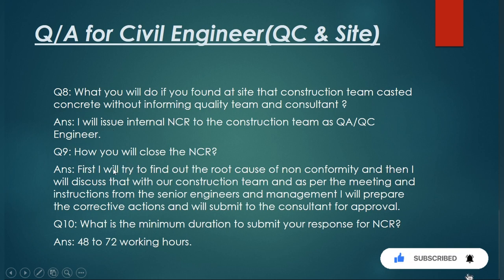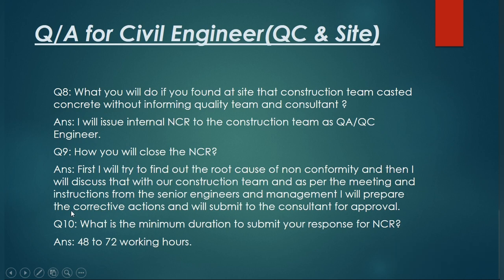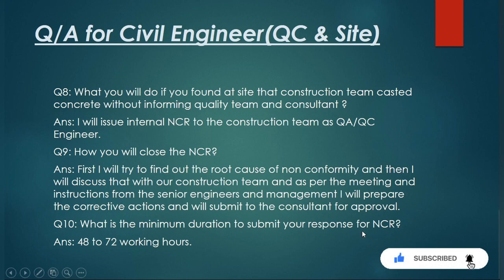Question number nine: how will you close an NCR? First, I will identify the root cause of the non-conformity, then discuss it with the construction team as per instructions from senior engineers and management. I will prepare the corrective actions and submit them to the consultant for approval. The minimum duration to submit your response or corrective action for an NCR is two to three days — meaning 48 to 72 hours.